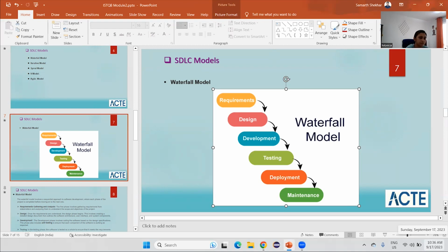They would normally start hiring every resource for every phase in the beginning. But when you are using the waterfall model, they will first hire the senior team to do all the requirement analysis and design. Then after that they will hire developers. So let's say they took a month to understand the requirements and design everything.